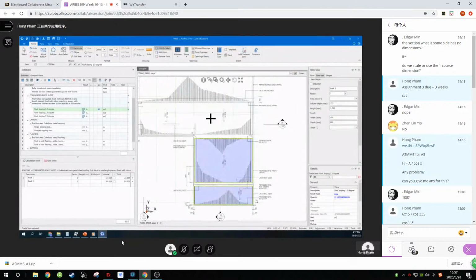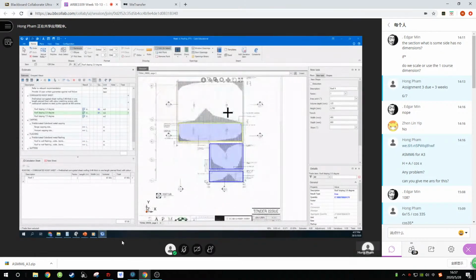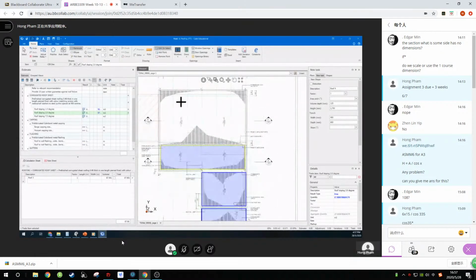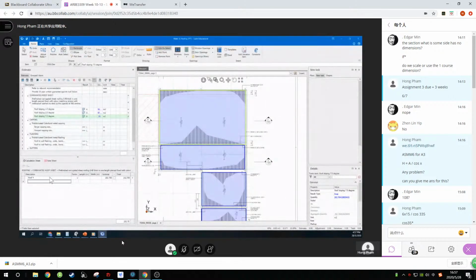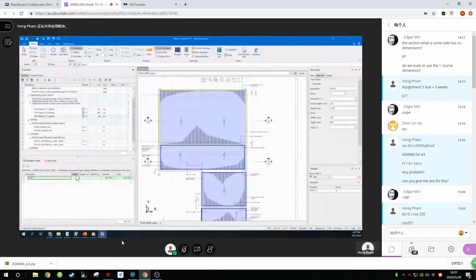Then you got 2 degree here. So you click to 2 degree here. I tell you, 1 and 2 degree is almost flat. I don't need to divide by cosine because it's about the same. Then you have another one here, it's 7.5 degree. Okay, here you are. For 7.5 degree, you see roof 4 here, right? This 7.5 degree we have here, 200 something square meters.